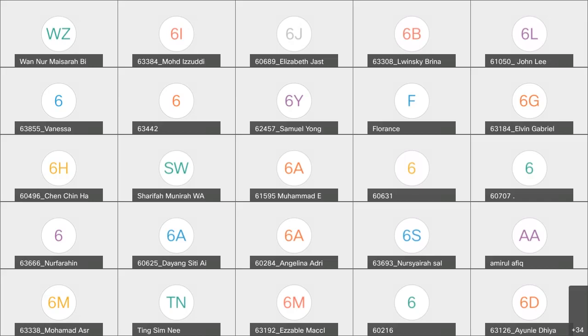So you can actually map out in your Excel worksheet all your list of activities, and then you can actually put in the labor and machineries. You can start to do that first. Then later on, when the work is completed, all you need to do is just change the Excel worksheet. The calculation will not really vary a lot. Even if you change the time a little bit, the quantity a little bit, you just have to key into your Excel worksheet, and then that will really be very fast already because you've set all the formulas there already.